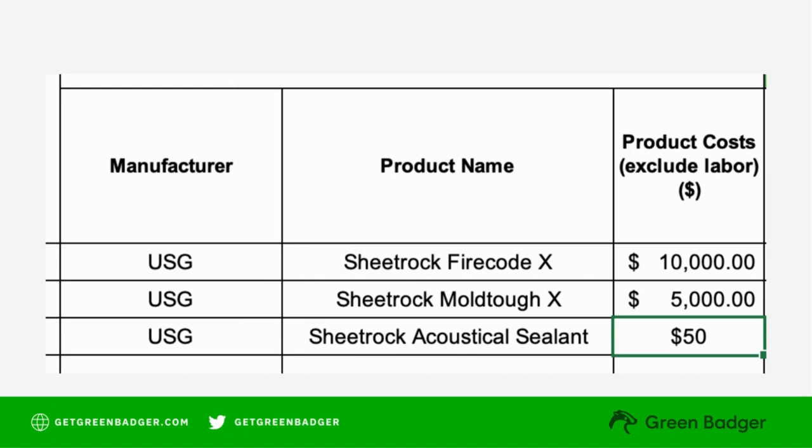In this example, we're using USG and we have two different sheetrock products as well as a sealant. It's very important to break out each specific type of product and the cost associated with each product. You can't just put sheetrock and then a $15,000 lump sum because each product has a different LEED attribute or the potential for different LEED attributes.